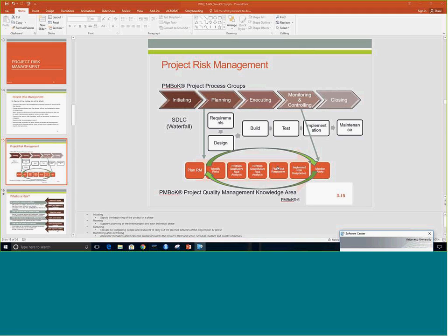That means you make an implementation plan, just like a mini project plan or a mini project schedule, and you assign somebody who's in charge of mitigating a risk or of working it off in whichever other way. And then ensure that the risk responses and their steps are being executed, which means they're going to be implemented, and then you're going to have to monitor them.